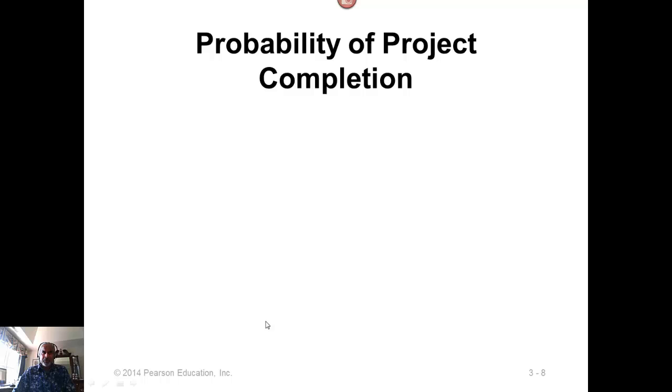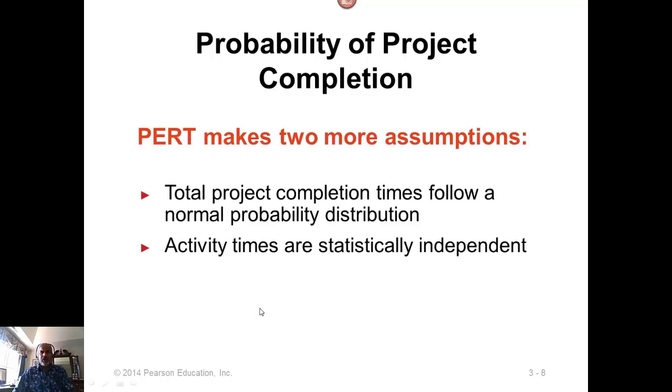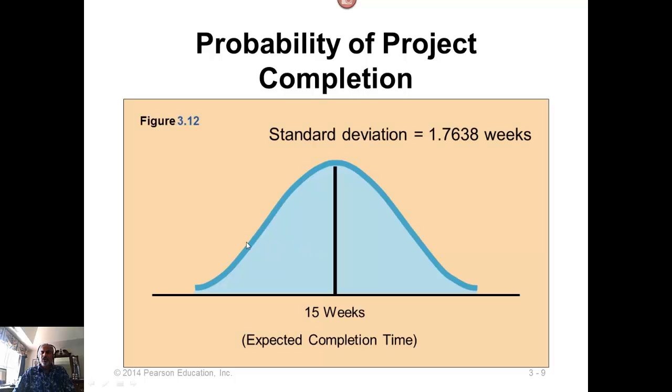Remember, for this project, the expected project completion time was 15 weeks. Now we have expected completion time of 15 weeks and the standard deviation. If the activity times are beta distribution, then the project completion time will follow normal distribution. And if the activity times are statistically independent, then we can compute probabilities using normal distribution. The expected time is the mean, the standard deviation we just found out.